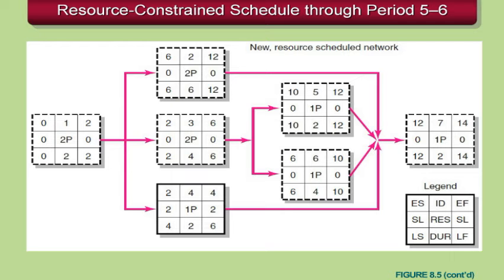A couple practical considerations before we show another example. Be sure that you don't change the logical constraints of the project network. It's sometimes easy to do when you're trying to schedule resources.